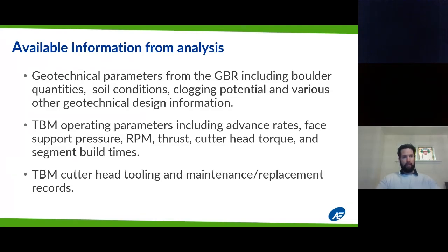And finally, we had tooling and maintenance records available to determine if the contractor was operating and maintaining their equipment, and in particular the cutter head, in accordance with industry standards. For instance, if they weren't maintaining their cutter head, and that directly resulted in slower mining times, that would not be something that the region would be responsible for paying for. So we wanted to make sure we had a fair baseline, and we were dealing exclusively with boulders and not with variations in how the contractor was operating their machine.